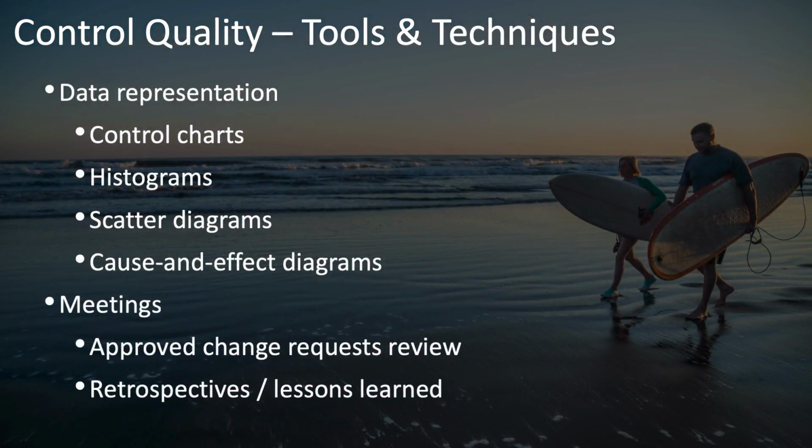There are also numerous data representation techniques, especially control charts that are applicable to control quality, as well as histograms and scatter diagrams that you can use to evaluate how well things are working, and cause and effect diagrams to explore issues. Also, meetings in which you can review approved change requests and hold retrospectives and generate lessons learned.